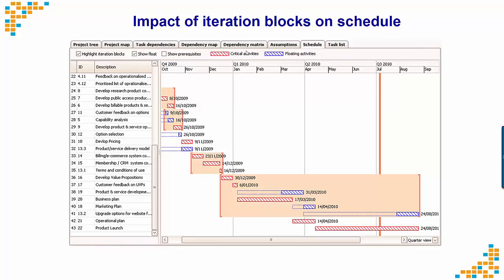And so when we traditionally would manage that strongly, we would actually probably also look after the iteration activities and potential for rework. But in the following iteration loop, you can see that only 3 activities are on the critical path, but we have 3 other activities with significant float which are part of that potential iteration block.